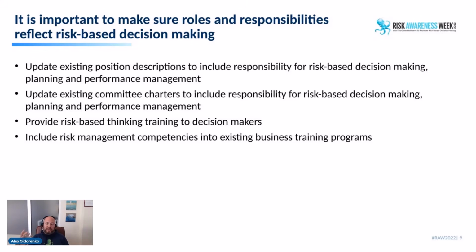Can we borrow some of your quants to build a risk model for it and help us make decisions? So we actually built a number of risk models for logistical problems where there was uncertainty: how many bad weather days, what the waves are going to do, the speed of loading, offloading, the delays on the train tracks. We could actually model all of that, and that's a very important decision making model.